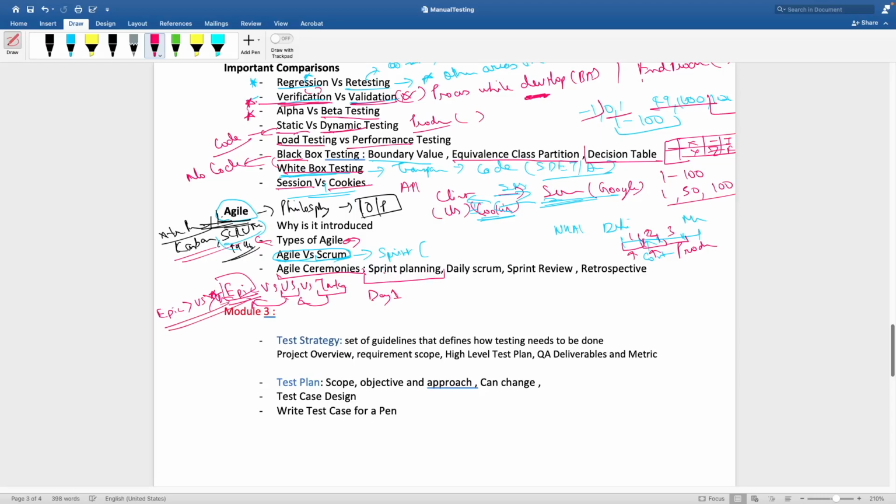And on day one of the sprint, we do sprint planning, and in this we pick up user stories and play poker. I mean, by playing poker, we estimate. Okay, estimation poker is the name of how we estimate. Different teams use different methodologies, but that's how we used to do it.